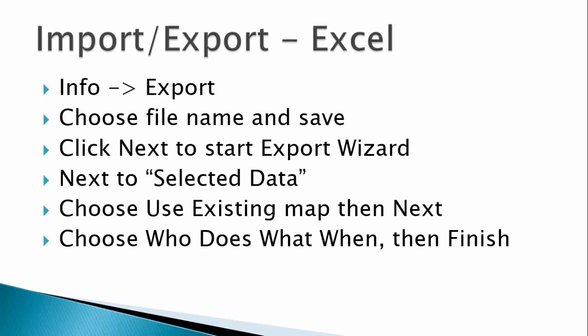Copy-paste of data might work well for smaller projects. However, when there are volumes of data of various kinds, it isn't always easy. MS Project 2013 has a solution. Let's imagine we want to know the assignments, as we did with the report in the previous segment. One way to do this is through saving the relevant data with Excel. Go to the Backstage view and choose the Export function. Choose Save Project as a file and choose MS Excel Workbook, then click the Save As button.